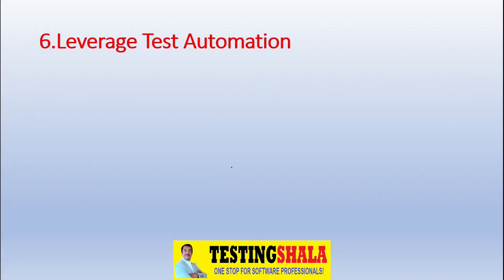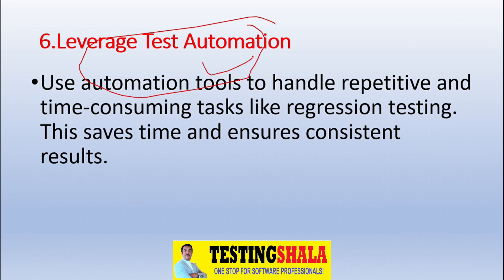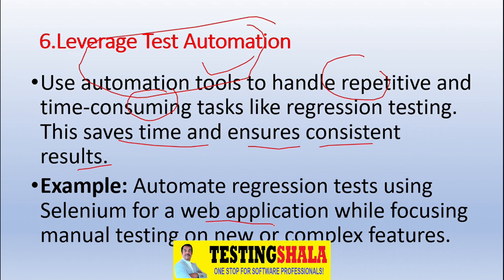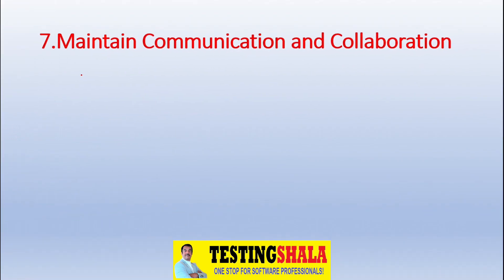The sixth method is leveraging test automation — not just depending on manual testing. We should choose the right tools to handle repetitive or time-consuming tasks, saving time and ensuring consistent results. For example, automating regression testing using Selenium for web applications while focusing manual testing on new or complex features. This balance between automation and manual testing helps deliver things more quickly.